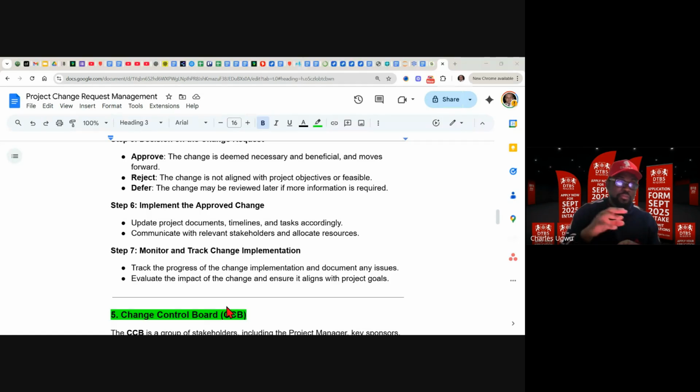If a budget has been made to do something, don't use it for another thing. It's going to be more deadly if you are working in the public sector, because they are going to term it misappropriation of funds. You use the fund meant for something for another thing. And you see your enemies will be multiplying. Everybody will be happy you are going. So, this is extremely important. Extremely. Okay. Let's move on.